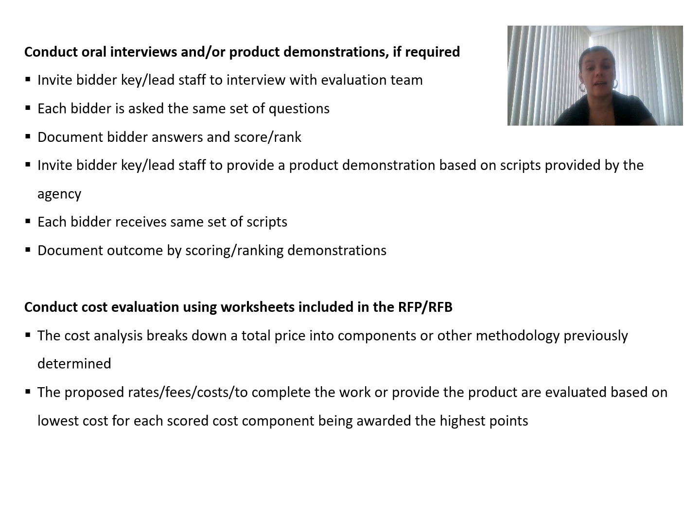In some cases, oral interviews or product demonstrations are required, so you need to put that in the document and invite bidders to interview with the evaluation team. Each bidder is asked the same set of questions as part of the standard process. The answers should be documented, scored, and ranked. Invite bidders, if needed, to a product demonstration based on the script provided by the agency. Each bidder receives the same set of scripts and document scoring, taking demonstration. Take into account that this part, demonstration and oral interview, should go through the same questions and the same process. This is to guarantee the transparency and the fairness of the process.